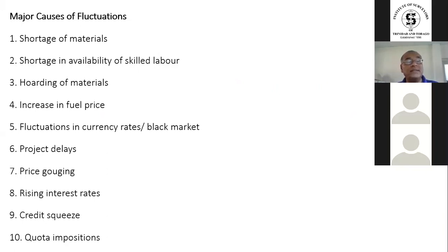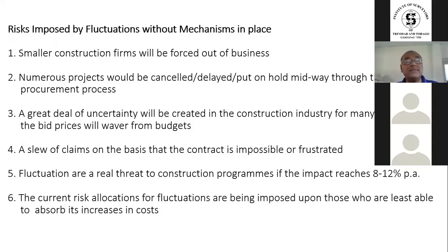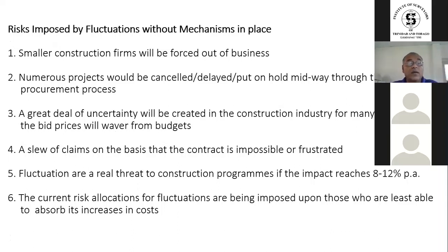You can see from that list that some of those things are already happening locally. The risk imposed by fluctuations without mechanisms in place: smaller construction firms will be forced out of business, numerous projects will be cancelled, delayed, or put on hold midway through the procurement process. A great deal of uncertainty will be created in the construction industry, as bid prices will waver from budgets. A slew of claims on the basis that the contract is impossible or frustrated. Fluctuations are a real threat to construction programs if the impact reaches 8% to 12% per annum or more.